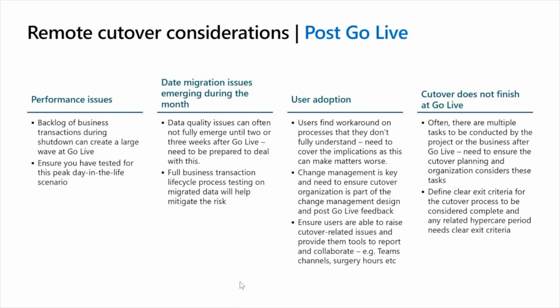Don't forget, cutover very often needs post-go-live steps also. You also need to think about the issues that emerge after go-live, right? As a cutover team, you bear some responsibility for making sure you help with resolution of issues that may have been caused by the cutover, either bad data or bad configuration move or something that was caused as part of the cutover, right? You cannot just dissolve the cutover organization and team at the moment the go-live happens.